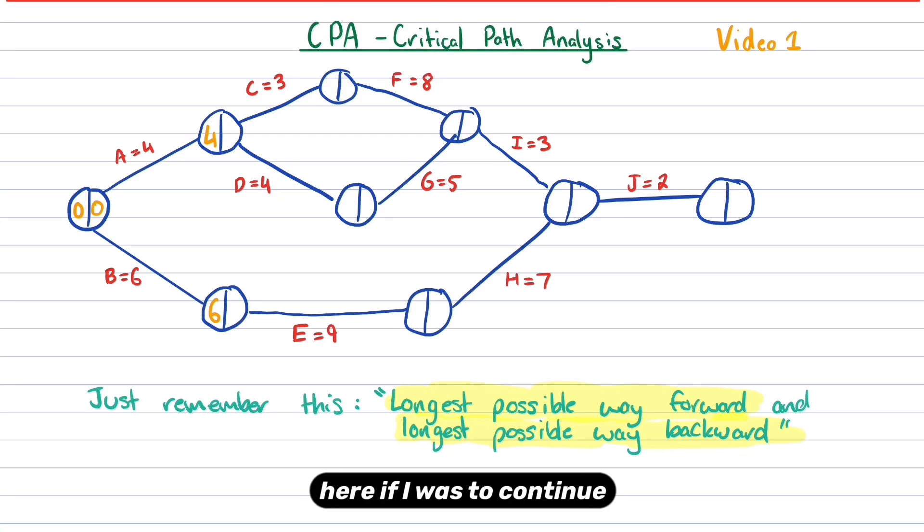And then along the bottom here, if I was to continue, six plus nine is 15. And then after doing activity D, because the only possible way to go to activity D is to go that way, it's going to be eight, right? Four plus four is eight. Then towards the top, once activity C is done, four plus three is seven.